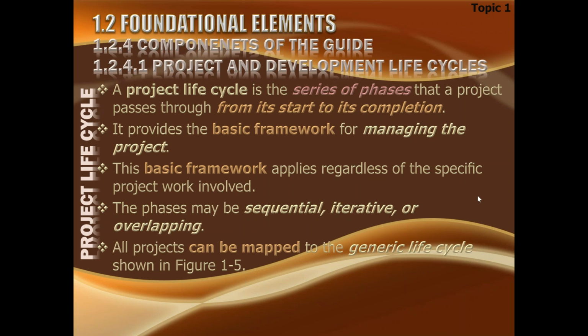Okay. I will discuss milestones later, but a phase is not a milestone. The end of a phase is what we call a phase gate. A phase gate is a point which accomplishes the phase, which vets the phase, which approves the phase. So a phase gate could be declared as a milestone. I'll describe milestones sometime later. Okay, thank you. Most welcome.